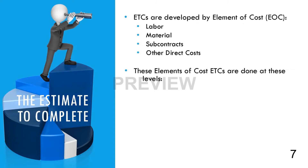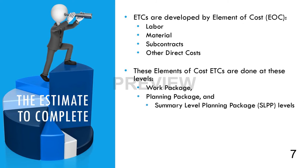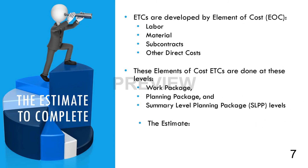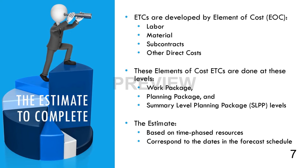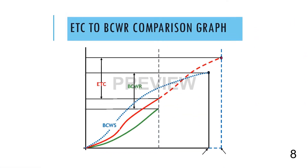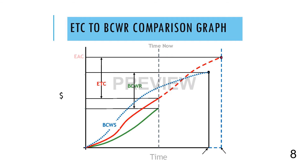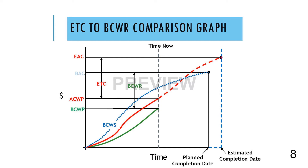This is done at the Work Package, Planning Package, and Summary Level Planning Package levels. This estimate is based on the available time-phased resources and must correspond to the dates in the forecasted schedule — the time-phased ETC must correspond to the time-phasing of the forecasted work scope. Putting these concepts together, the ETC is the difference between the EAC and the cumulative ACWP. This value represents the forecasted costs to complete the work remaining, and the budget value of that work is calculated by subtracting the cumulative BCWP from the BAC.